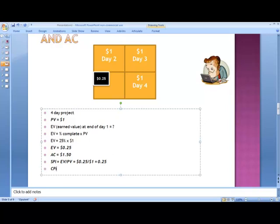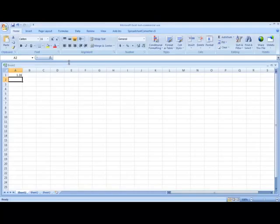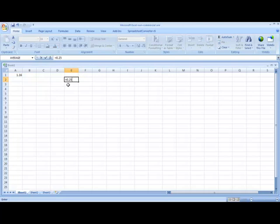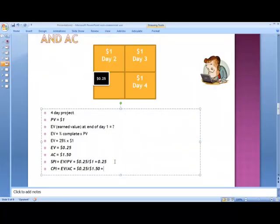Now, talking about CPI, CPI is equal to EV divided by AC, and that's equal to 0.25 cents, or dollars I beg your pardon, which is 25 cents divided by AC, which is $1.50. So if you do the math, 0.25 divided by 1.5, and that's equal to 0.167.